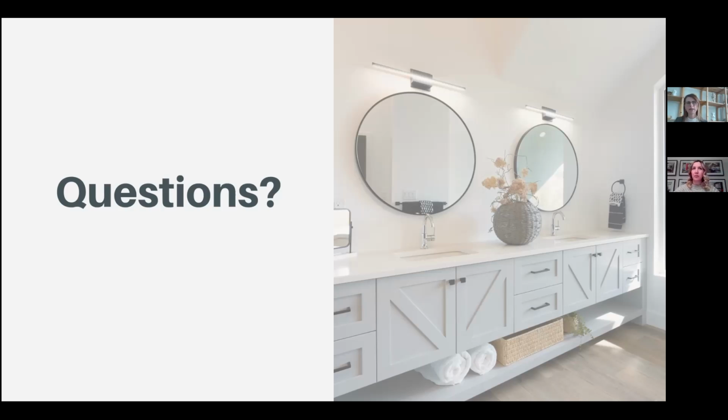The builder will come in. They will give an idea of what they want. And the builder will go, I think we could do that for $100,000. But they have no idea what the design is at this point. So it's a very loose number at best. So if you're thinking of hiring a team, bring on the design team first. Whether that's a designer like ourselves or an architect, get the design done on paper while the team is looking at it from a contractor point of view. So have that team brought together, but start with design and then building will come.